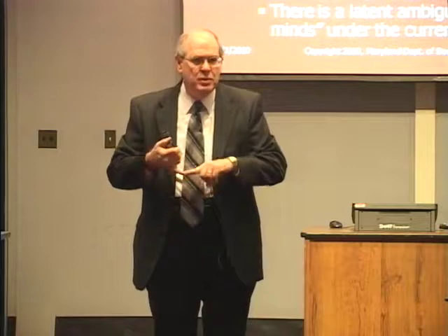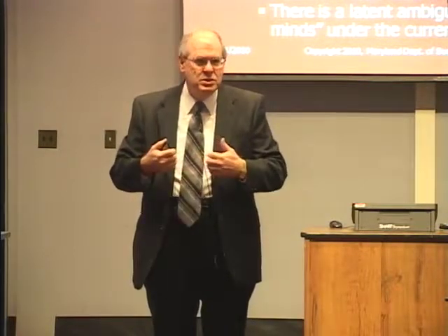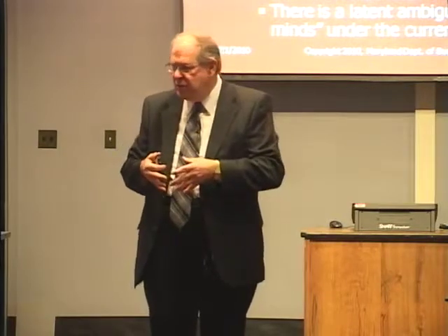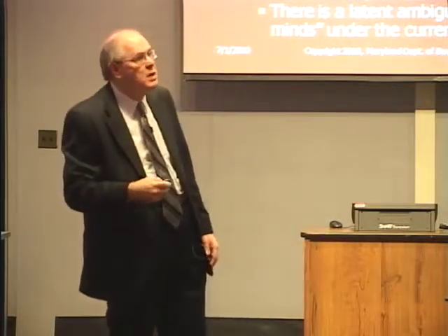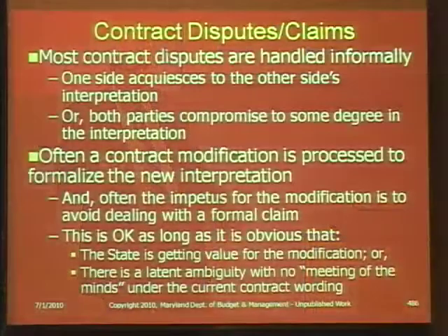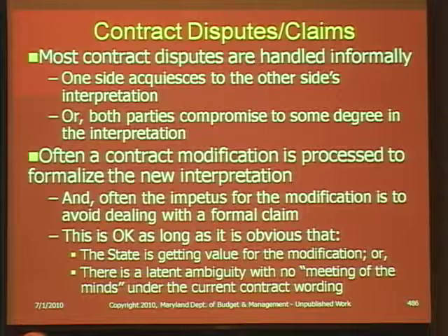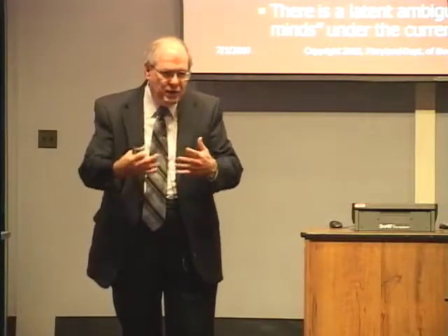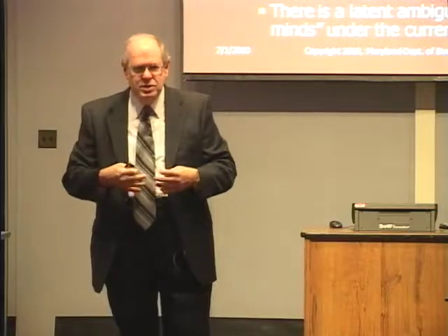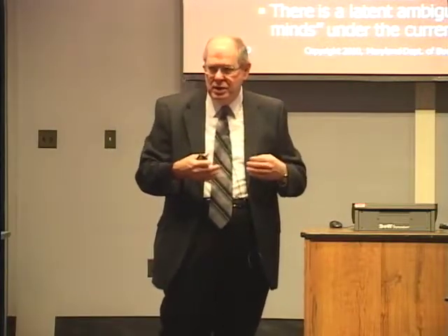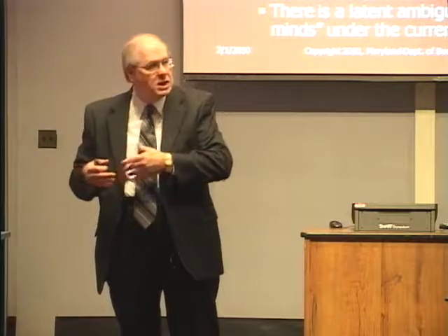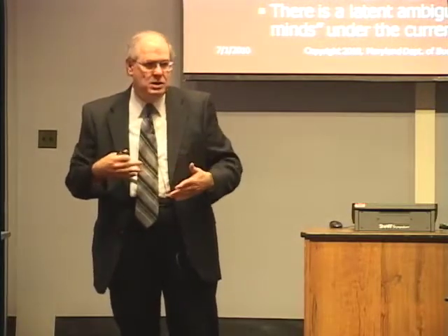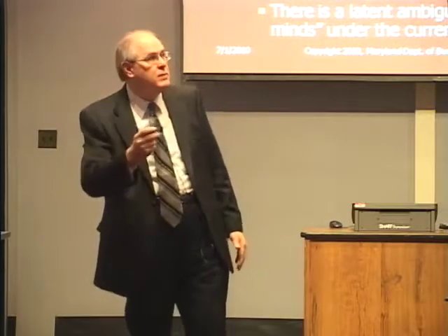But what you try to do is avoid even getting to points of dispute by having the procurement process done properly, with getting clarifications and making sure as much as you can that things are very clear-cut before you get to the point of performance of the contract, so that you hopefully don't get into dispute situations. You try to avoid them, you don't always do it. And there's a correlation between how well you do the procurement phase and how well you try to make sure that you've eliminated ambiguities and you've gotten questions from vendors and you've properly answered those questions and you've gone through oral presentations if it's an evaluated procurement. And the better you do that, the more likely that you're going to not have problems in the performance stage, at least from the standpoint of lack of understanding of what both sides supposedly have contracted for.